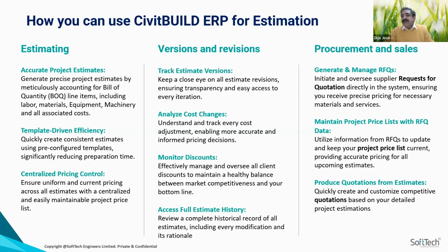Accessible estimation history. Moreover, coming to procurement, these are the challenges we face during estimation. Most quantity surveyors go with standard pricing based on their experience in previous projects. But if you want to take an estimation from the market by releasing an RFQ, a request for quotation, you can make use of the procurement module so that you get the most updated pricing from your suppliers and even your subcontractors, and that can be incorporated into your estimation at any point of time.